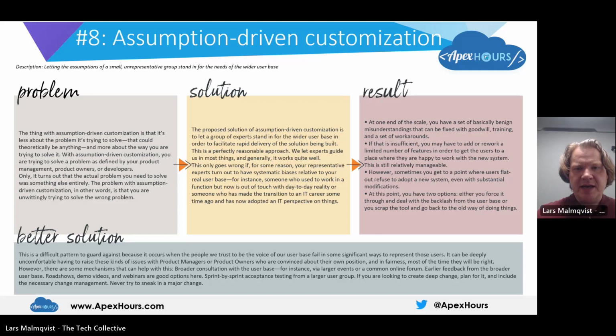And then, start thinking about the change management aspects of what you're doing upfront, rather than just leaving it to the end and saying, we're going to build this thing and then we're going to roll it out. That can be very dangerous. Like, engage early, plan change management activities early, make sure that you know how your product is going to actually be adopted by the user base, not just how you're going to build it.